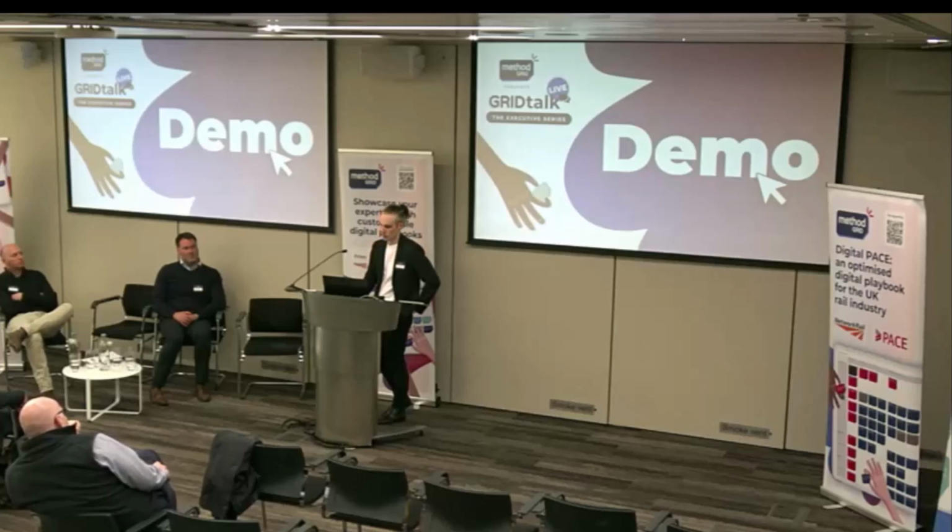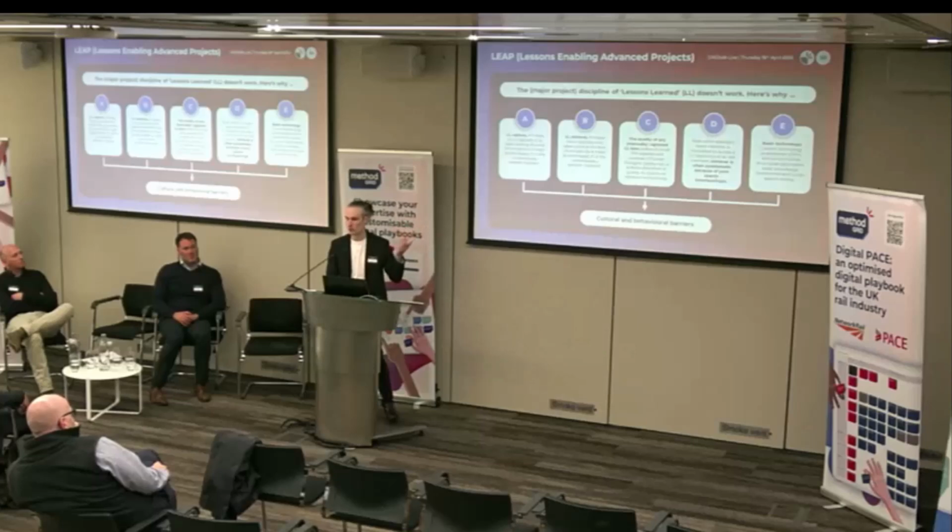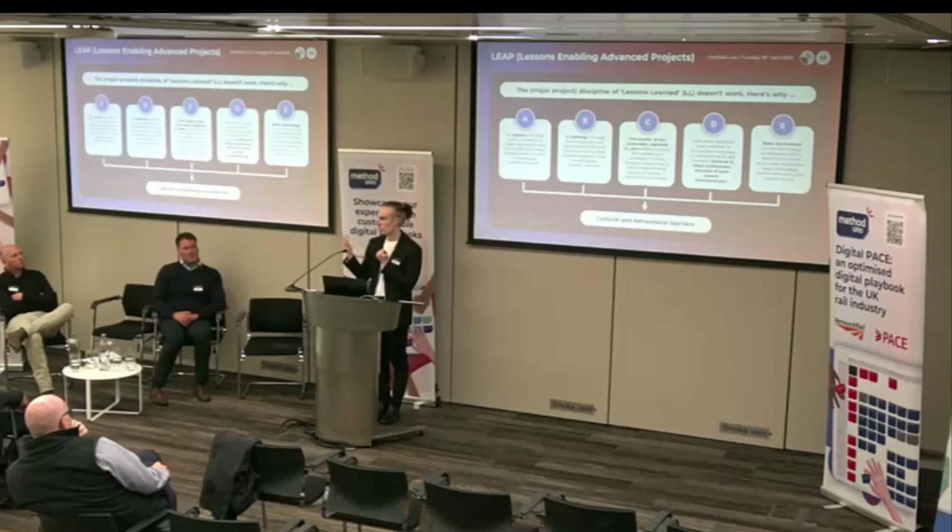So one of the things we've talked about, and I'm not sure if we have, so these are all the different aspects of this whole project. I've just talked about improving the quality of a lesson as you ingest it. The other aspects are, when is the best time to capture a lesson? We talked before about the Gantt, if we can figure out anomalies based on scheduling data. If you've got a whole bunch of projects and a certain stage usually takes 10 weeks, whereas you've managed to do it in half that time, maybe that's a little trigger that can say, is there a lesson here that you could share with other people for what went well?